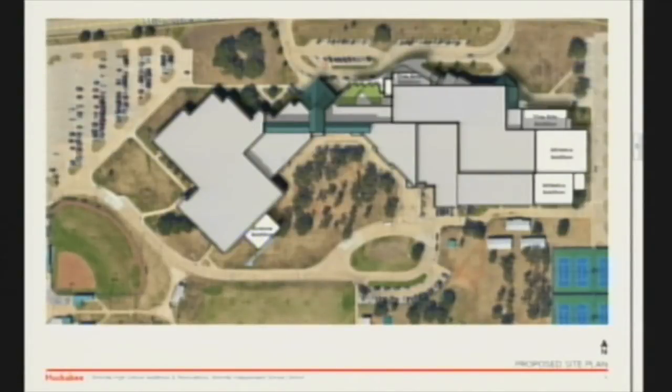I think I was initially looking at the eastern side of the academic wing. There's a lot of grade change there, and it would be relocating a ramp and a lot of site items there. We really think with this addition where it is, we may avoid the well field entirely, or we may hit 2 or 3, but it's pretty insignificant. It'd be pretty comparable cost-wise to where if we had to do all the extra grading work on the east side. We also looked at the west side of the academic wing, but that's where there's a lot of geothermal lines running through there, so we wanted to avoid that.